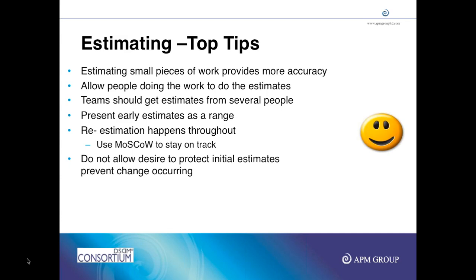So you have a range. Now, what you have to do is, once you know a little more, you have to be specific. So the 1 month variance should come down to some weeks, and later on it should come down to days. As you go into more and more detail, you can't keep saying it could be plus or minus 1 month, or plus or minus 10,000 pounds. That 10,000 amount or the 1 month should keep coming down.